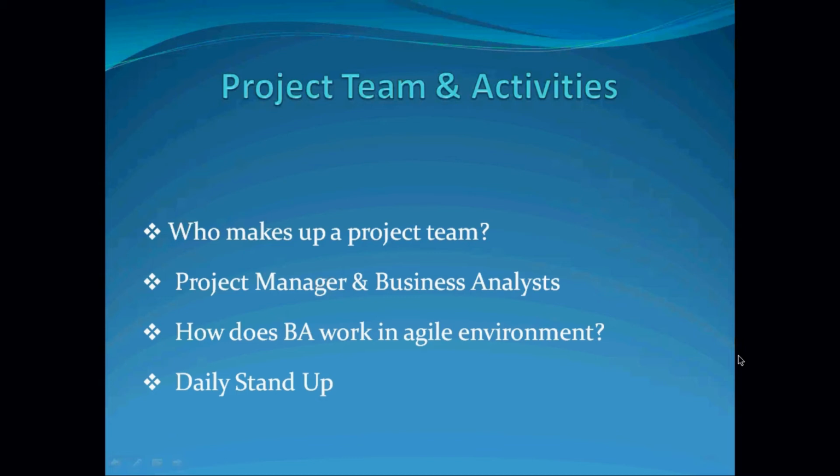And I remember as the BA team, we usually have our daily stand-up, mainly solely for the BA team. Because we had 4 BAs on that project, within 15 minutes, I will give updates on what I completed the previous day and what I'm doing at the moment, and if I have any blocker or any issue that is preventing me or that may prevent me from going forward. So probably 2 or 3 minutes, and I'm done. The next person will say the same thing, and sometimes you could even round it up in less than 15 minutes, but it's usually high level points.